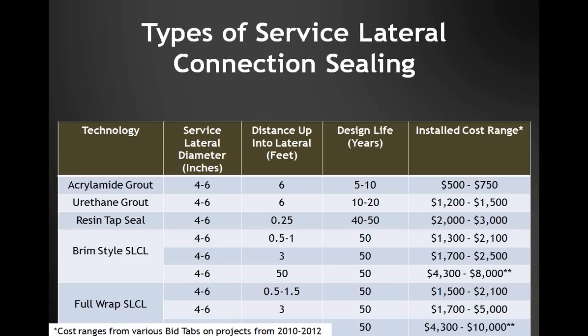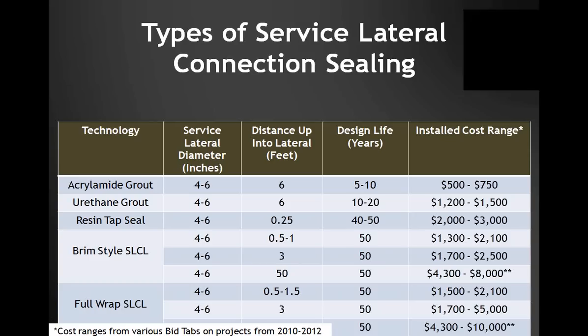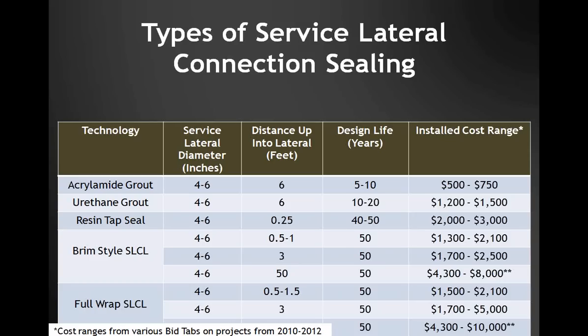This table shows the different types of service lateral connection sealing available, how far up into the lateral each technology can seal, design life of each product, and a range of installed costs. Service lateral connection liners can extend up 50 feet or even further — up to the house, the property line, or the clean-out, depending on how much the municipality owns. The further up you go, the more expensive the liner becomes, but it's not a linear relationship due to installation methods and material costs.